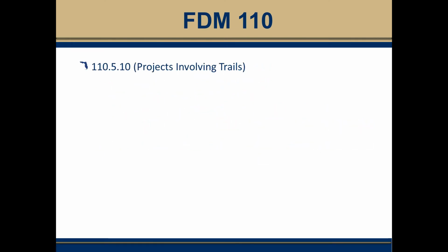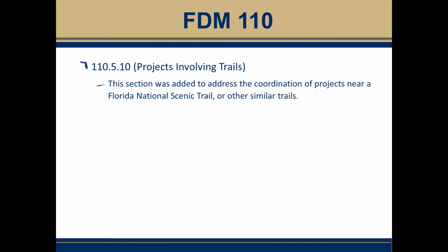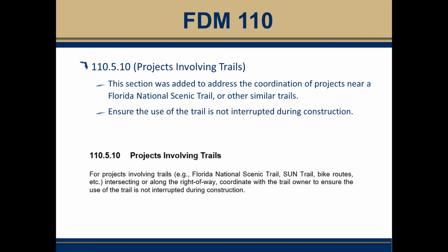110.5.10 Projects Involving Trails. This section was added to address the coordination required for projects near Florida National Scenic Trails or other similar trails. We want to ensure that the use of the trail is not interrupted during construction. Below you can see the new language.